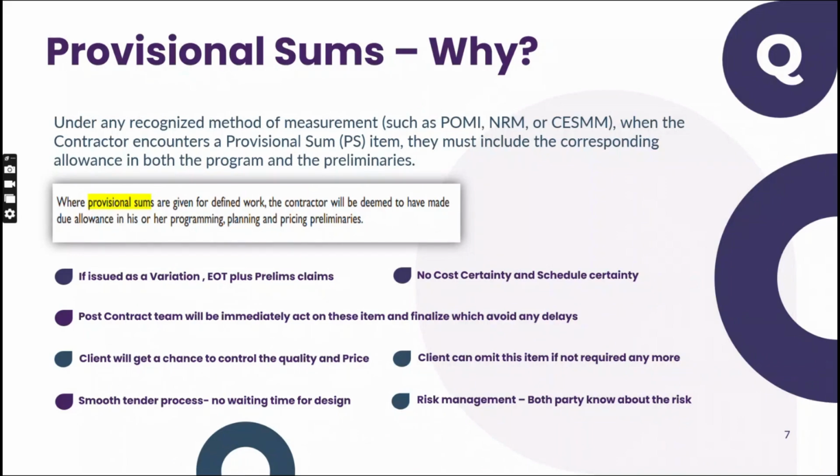Sometimes infra and infra landscaping have very expensive items. Maybe your contract is 1 billion and infra is maybe 300 million. So you have considered that much prelims in your submission. You might have considered all the infra engineers, all the infra managers, all the inspectors, QS inspectors, everything in the prelims. So if I am taking out that item, I can take out the prelims also.